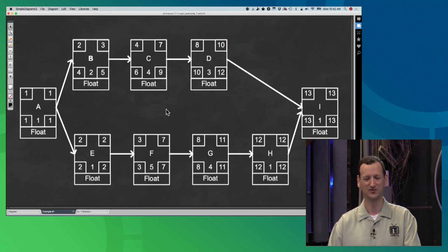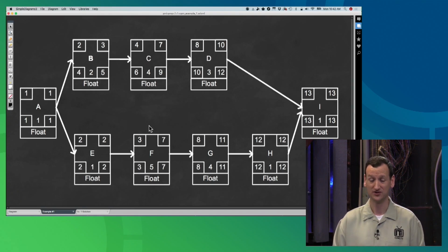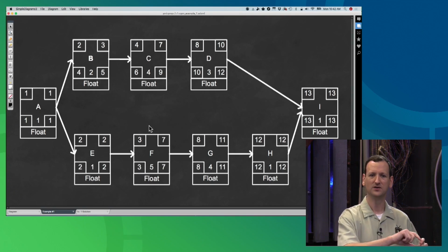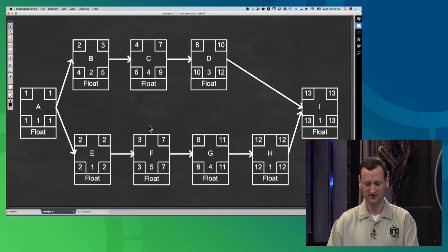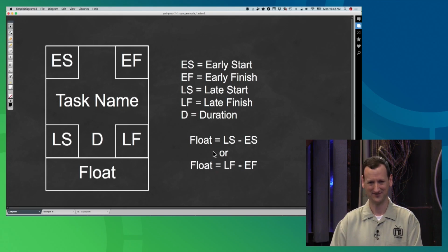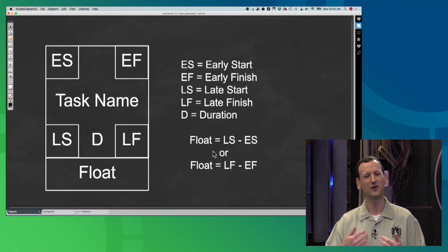So on the exam, we have to do it by hand. If they're asking me for early starts and late starts and things like that, I'm going to have to calculate it, right? But if they're just asking for float, just by calculating out the earlies, then I could figure that out. Well, actually, no, I couldn't, could I? I would need my early and my late to subtract those out, and so I am going to have to do that forward and reverse path to get that float. I'm going to have to get a little more data there. So you got to figure out what is that bare minimum of data to get in and calculate it out.